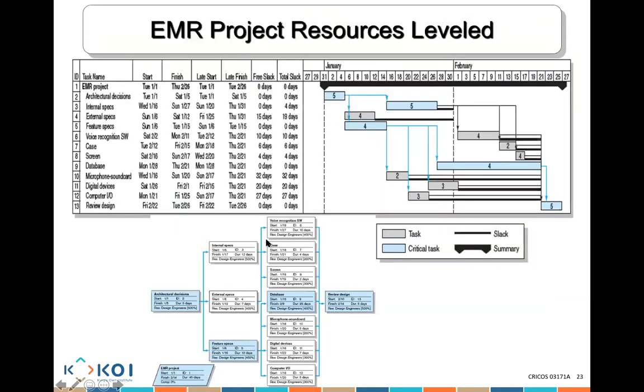So if you look here, this is 4, this is 5. 5 finished on the 15th of January. Can you see this? And then 3 will start on the 16th of January. Why? Because you need to finish 4 and 5 first.